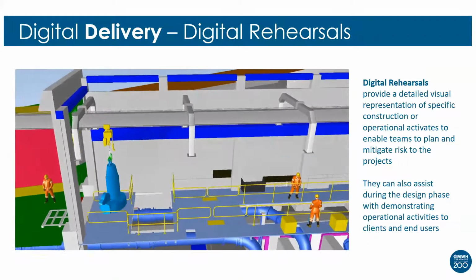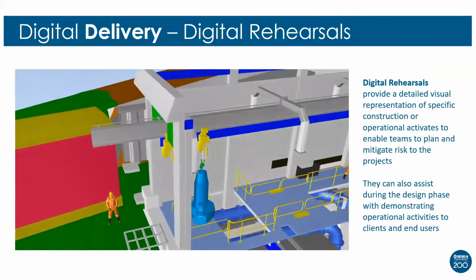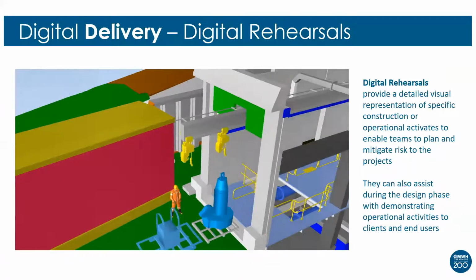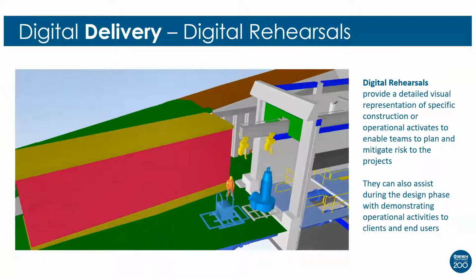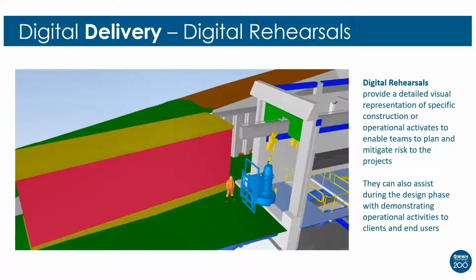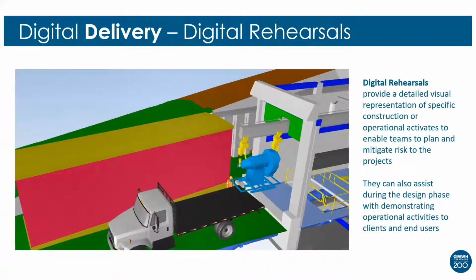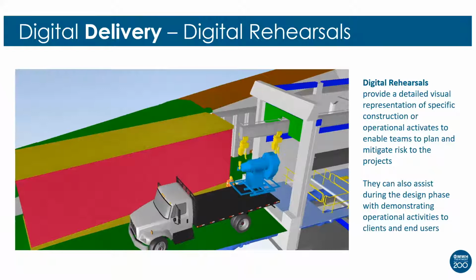But the key part was, how do we get that pump out of the building and safely onto a vehicle, because we haven't got the height. So the guys were able to demonstrate, using the trolley arrangement that came with the pump, how it's top and tailed using the two cranes, and how we ultimately lift that safely onto the vehicle. So a relatively simple, quick, cheap way of demonstrating how to do a task.